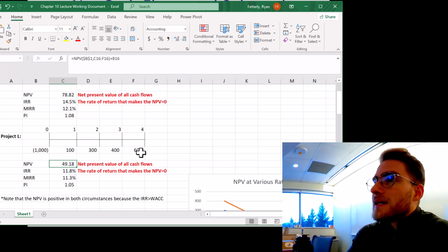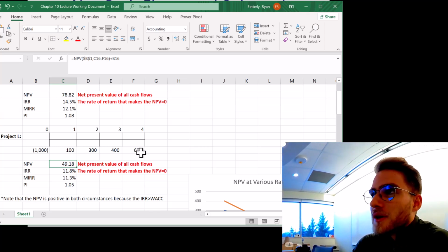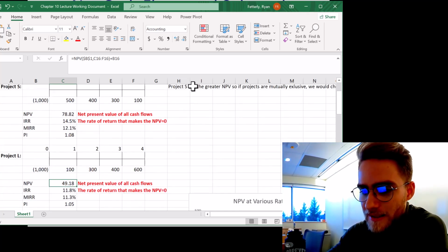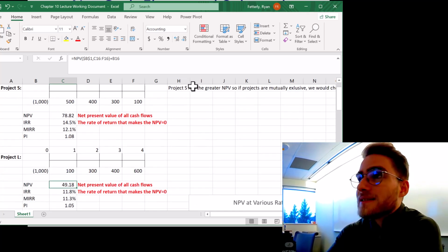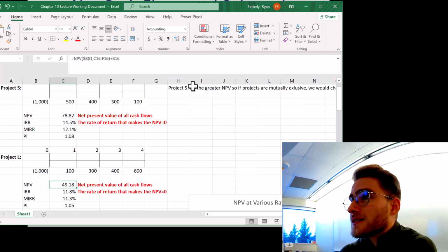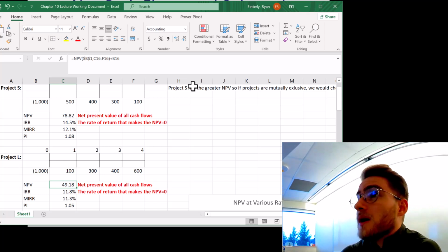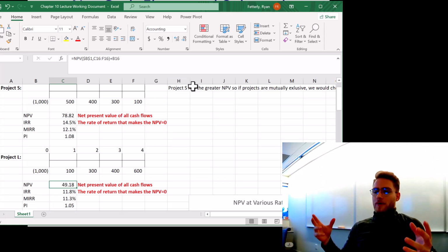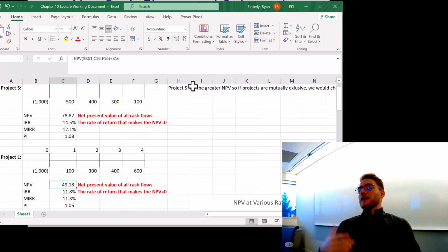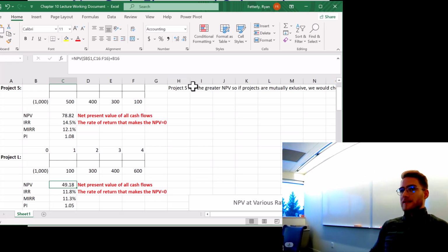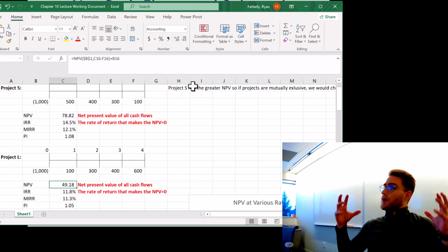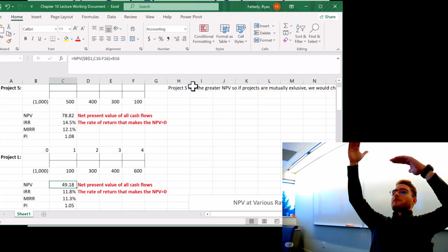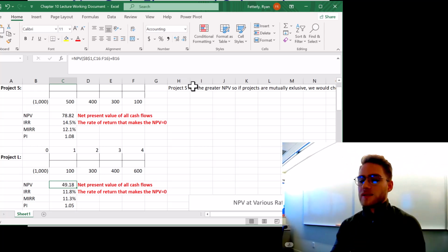So what that means is Project L in today's dollars increases the value of the firm by $49.18, right? Now, it's tough being online because it takes longer to ask questions, but I'm going to ask a rhetorical question. Would you rather someone gave you $78.82 in today's dollars or $49.18 in today's dollars? Well, if you could pick both, you would probably pick both. Right? You would say, give me $78.82 and give me $49.18 as well, right? If we can invest in both projects, then we would just take both because they both provide positive value to the company today, right?